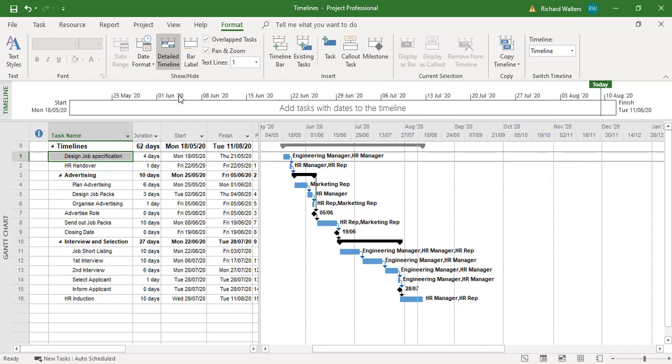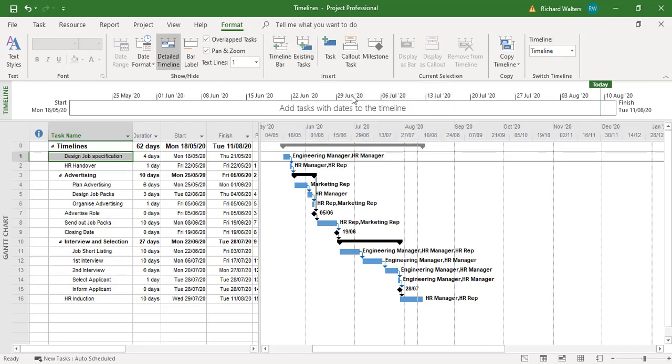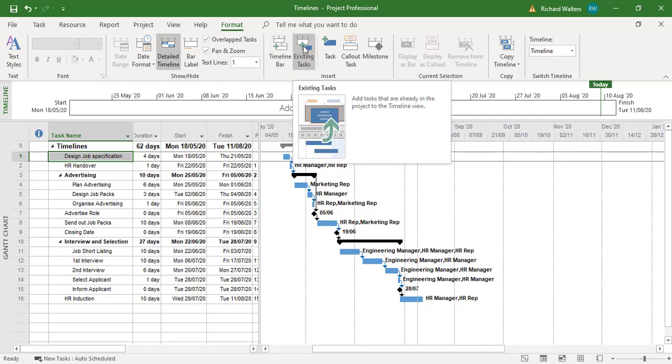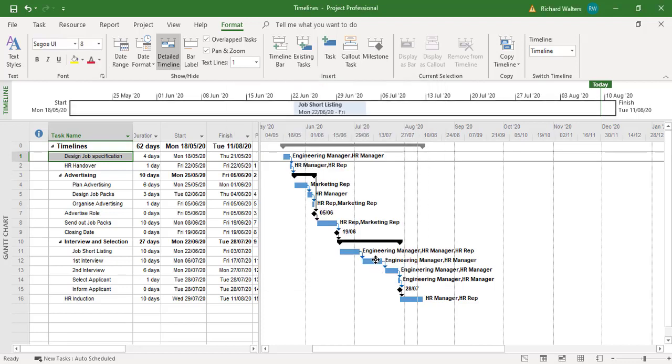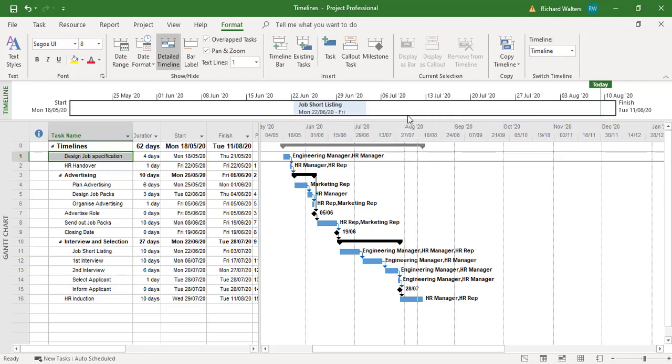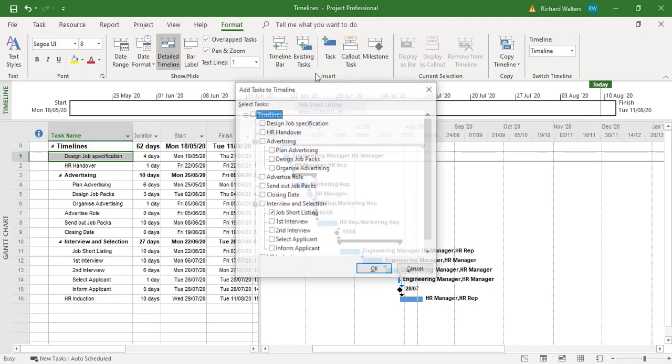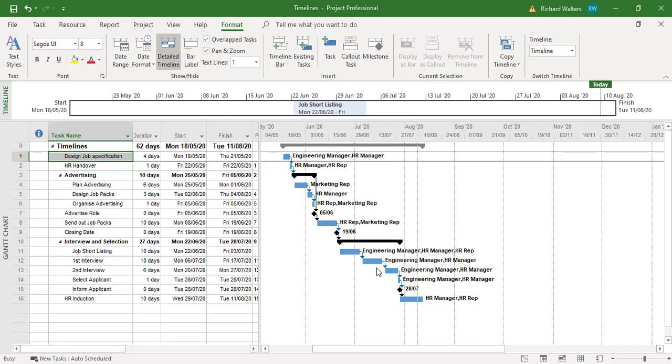So for example I can use existing tasks to add to the timeline. I'm going to add job shortlisting. So now I can see where job shortlisting appears instead of looking down the list. If you have important tasks you can then show them. I can add others. So I can add design job specification.